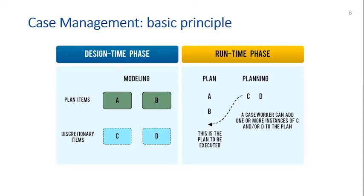The basic principle of case management is that at design time, when you conceive how you're going to manage cases, you define tasks as plan items. A and B are tasks you will always do. On top of that, you can add discretionary items — possible activities that you might want to do but that will not always happen. At runtime, you create a plan with activities A and B, and then the case worker, depending on the case's characteristics, can add C, D, or both to the plan.